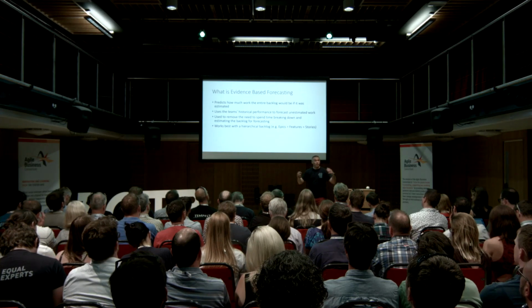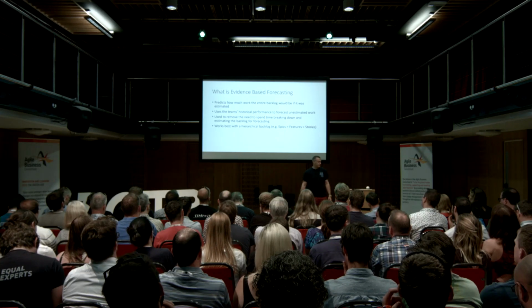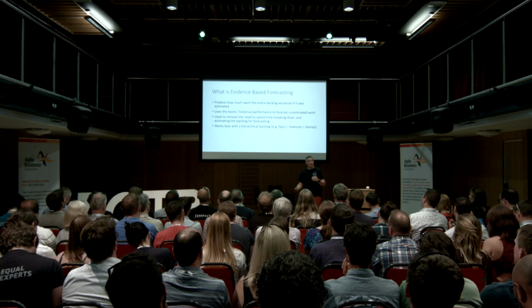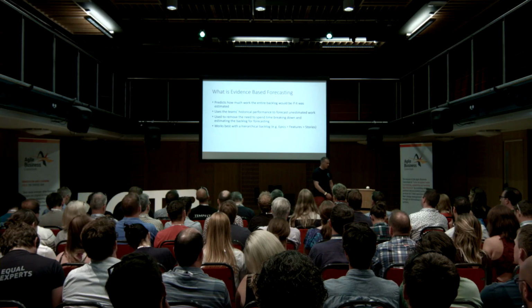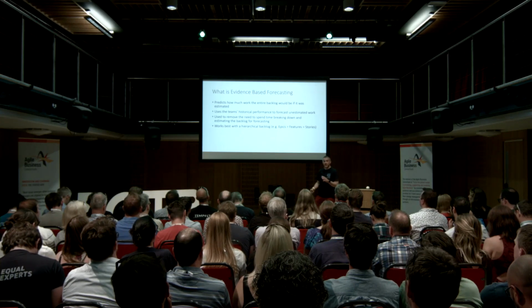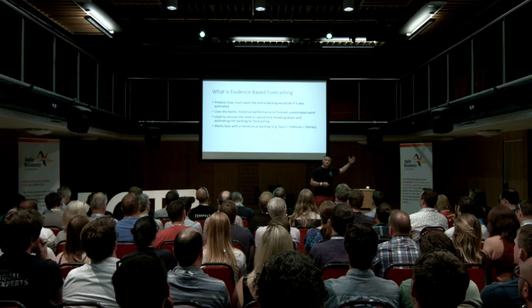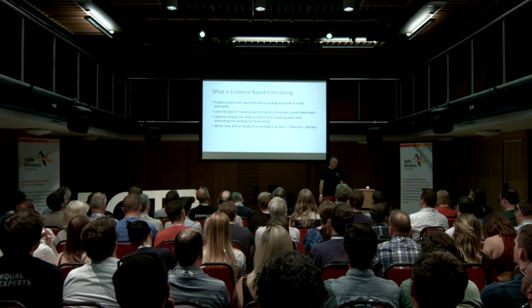It helps me think about what are the big buckets of functionality I want to deliver, and then everyone can have an idea of, okay, this is what the scope of this project is. Then as it gets closer to actually getting some people to code it, we'll start breaking it into features and then into stories from there. But this approach works with anything, any number of levels. You can have just one, or you can have 6 or 7. The logic is quite simple and it works for anything.